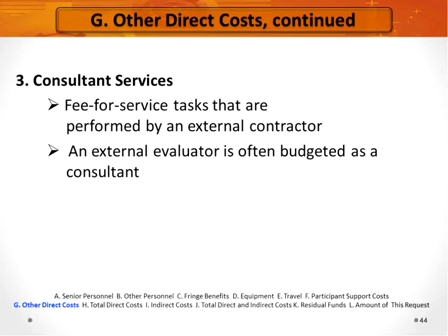Moving to consultant services. This is where you would budget for people that are working on your project but are not a part of the project staff. So those individuals that are paid a fee for service as external contractors. Note you'll need to identify and justify your need for consultants in the budget justification, as well as include anticipated cost and length of service. That gives the detail of how many hours or days the consultant will work and at what rate of pay.